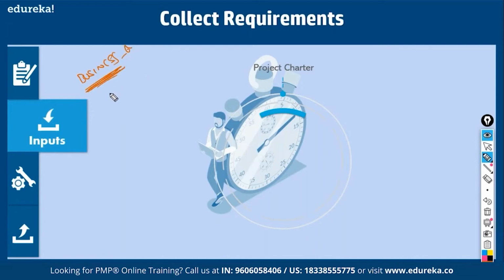Then you have functional requirements, what a particular product should do. Then you have non-functional requirements. For example, the battery should be working for 6 hours, right? Okay, there is a non-functional requirement. If you're designing a website, well, the screen should load within half a second. So non-functional requirements. Quality requirements. Quality requirements refer to what tests it should pass, what are the conditions against which it has to be tested, right? Then project related requirements, for example, what are the milestones for this project? What are those requirements that you have to meet? Okay, like this, we have to gather a lot of requirements.